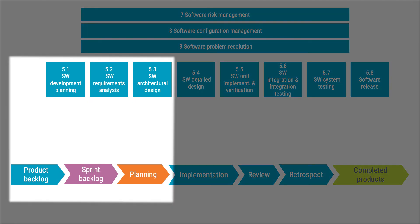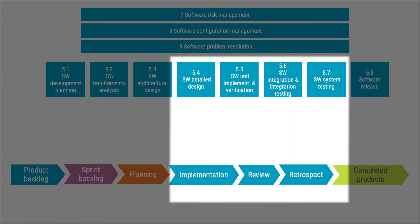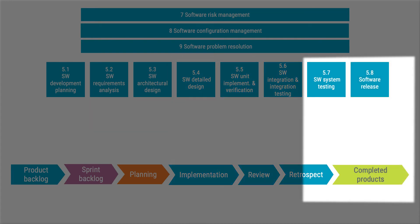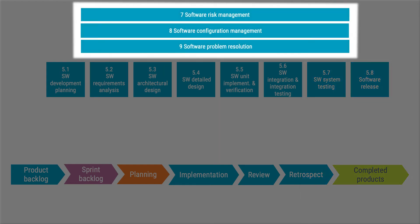In the first three activities of the standard, we have software development planning, software requirement analysis, and software architecture design. Here I argue that you can find many similarities with what in Scrum is called product backlog, sprint backlog, and planning. In the next part, you find actual coding work and confirmation that implementation meets defined requirements. Yes, the words and terminology are different, but the purpose and goal is very similar. Lastly, you find software release - depending on the system you're working with, this can be a full product release, or a software release which will be integrated with other systems such as hardware. In the standard, you also have other supporting processes, but I'll leave them for other videos.